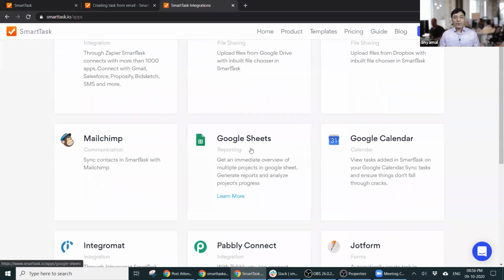Now, if you have your projects and your portfolios, and portfolios have multiple projects under them, you can link a portfolio with a Google Sheet. Typically your management teams may not be utilizing the software, but you can share the Google Sheet with them. It automatically gets refreshed every 1 hour with the project details, the milestones which have been completed, the current overdue tasks, and the current due date for the project. So yeah, you can integrate with Google Sheets.